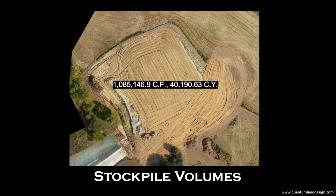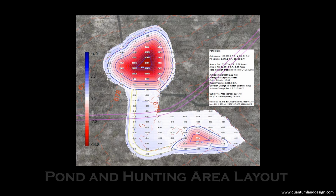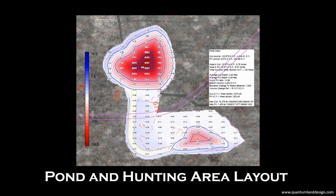Exactly. Think of it like building a house. If your foundation is crooked, the whole structure is going to be unstable. Same principle applies to machine control models. Okay, that makes sense. So verify site control points. What else? Another crucial step is to double-check key features in the field. For example, if you're excavating for a foundation, don't just rely on the model. Have your surveyor stake out the corners and confirm those dimensions before you start digging. That seems like a simple enough step, but I could see how it could save a lot of headaches down the road.